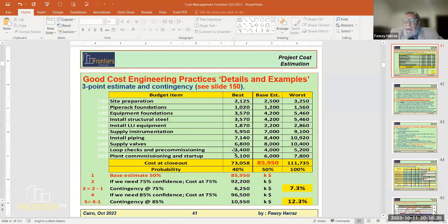What we said about that is, your conceptual estimate is something like plus or minus 25%, because it is based on fairly limited information. Now, your design concepts are further developed into detailed design, detailed quantities, detailed specification, and that should bring a big difference. So this is the standard 15% maturity of the project, then the 60%, then the 90% as an estimate for project completion? This is the AACE classification.